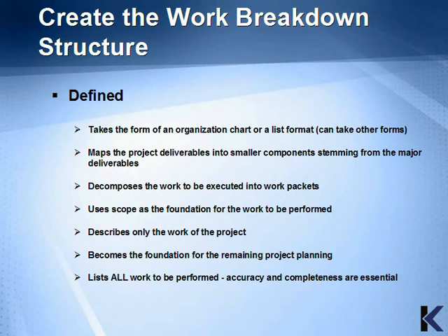In this section, we'll talk about the work breakdown structure, its inputs, and its tools and techniques. The work breakdown structure is an all-inclusive list of the work components that need to be done for the project. Essentially, you're taking the deliverables listed in the scope document and decomposing them into smaller and smaller packets of work until you reach a size that can be identified as a task in a schedule.